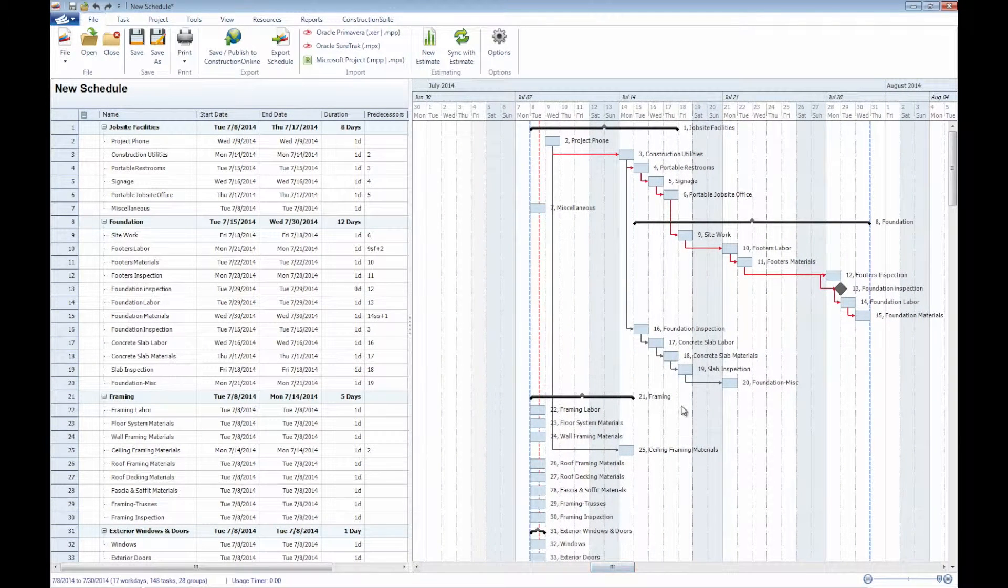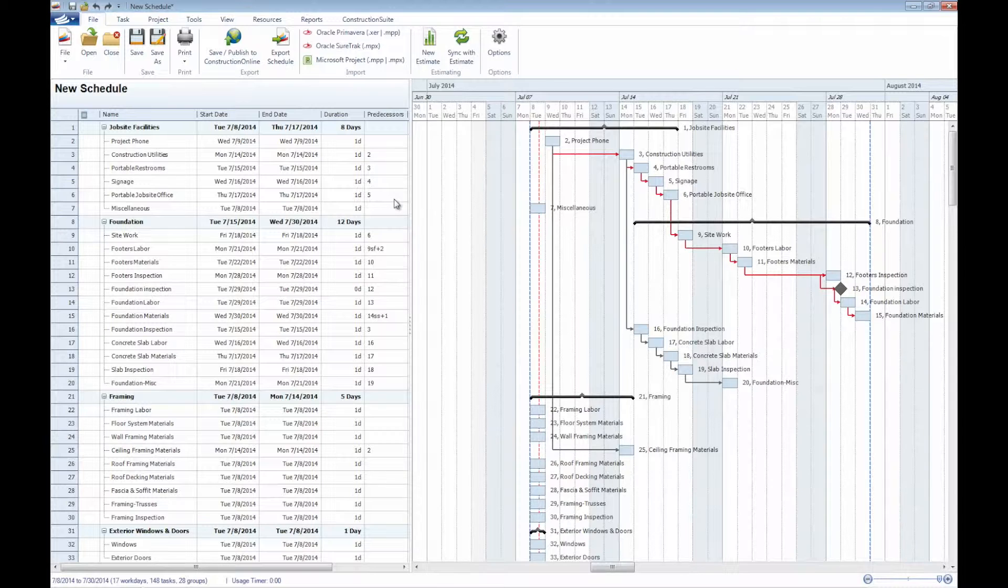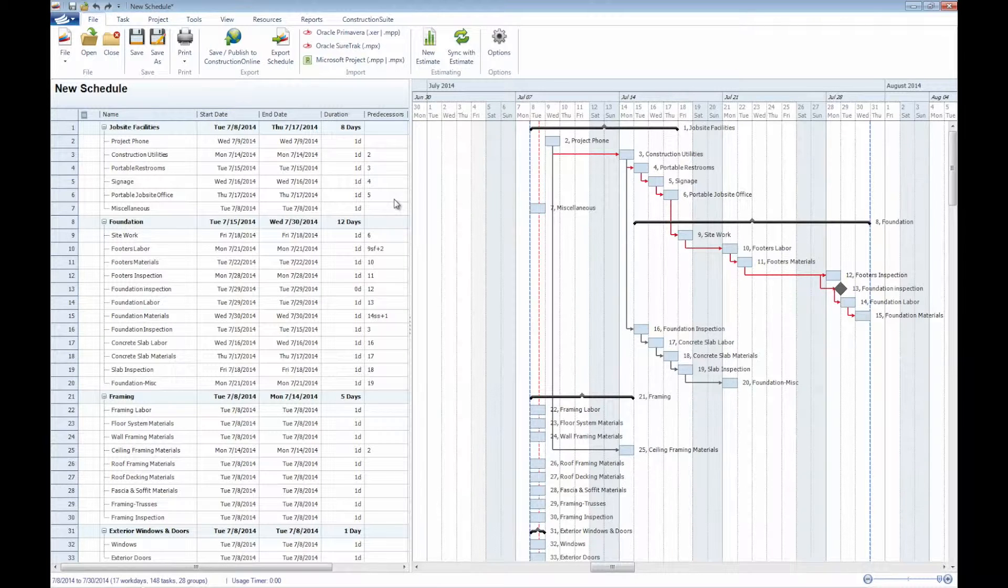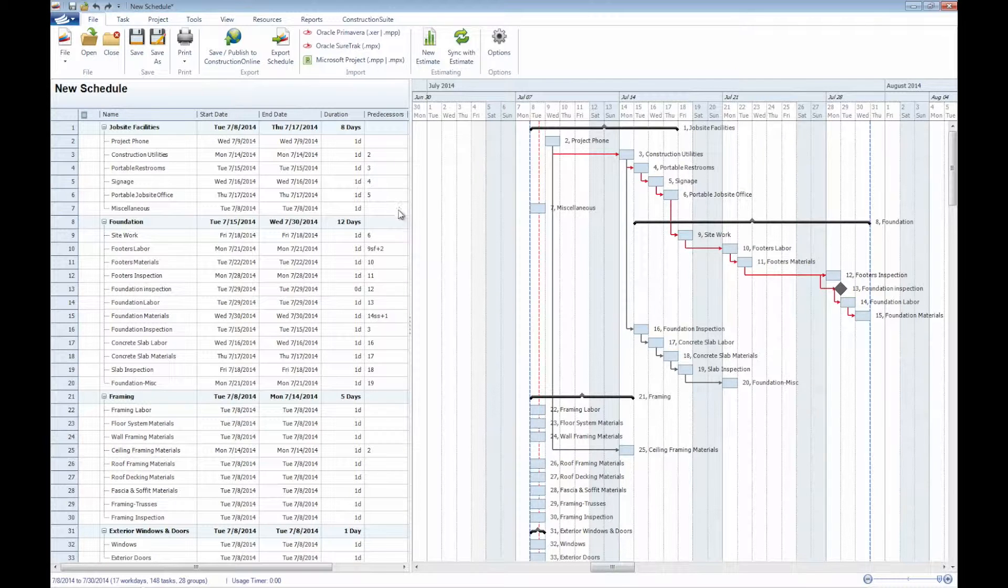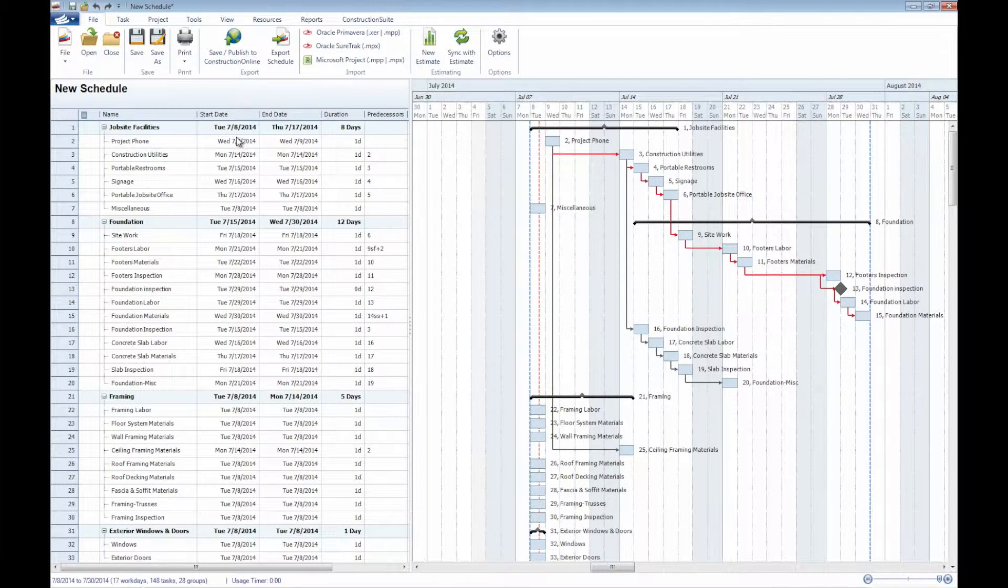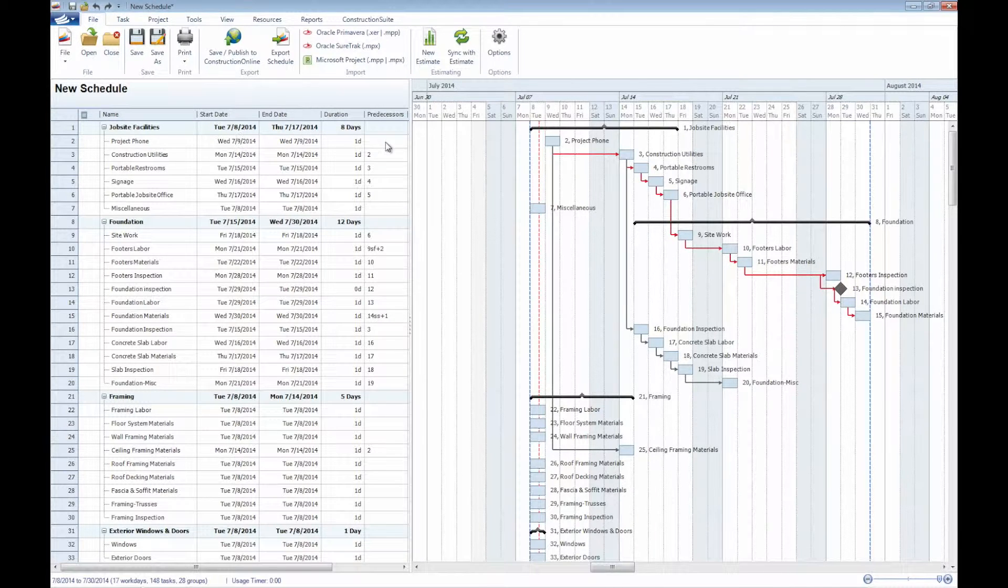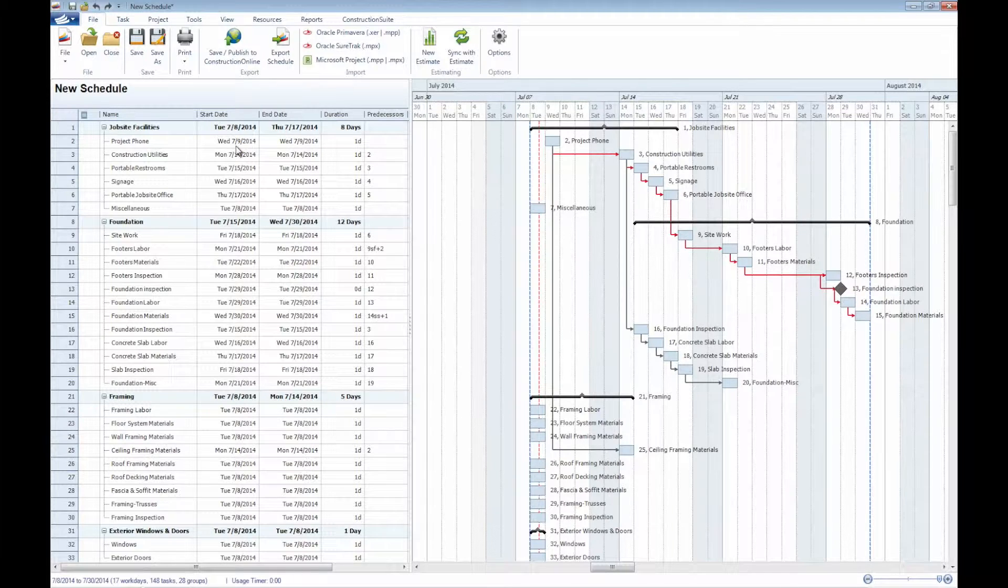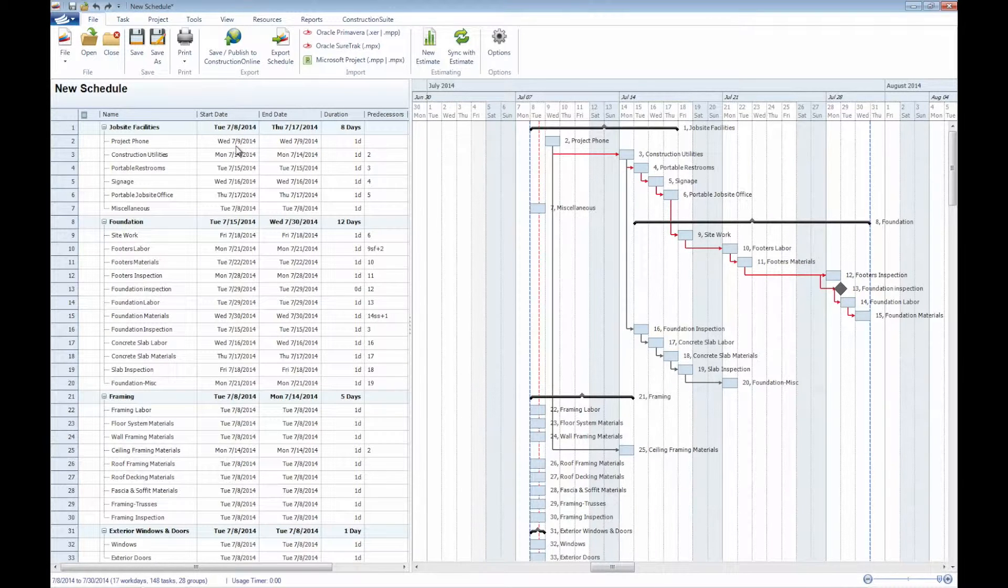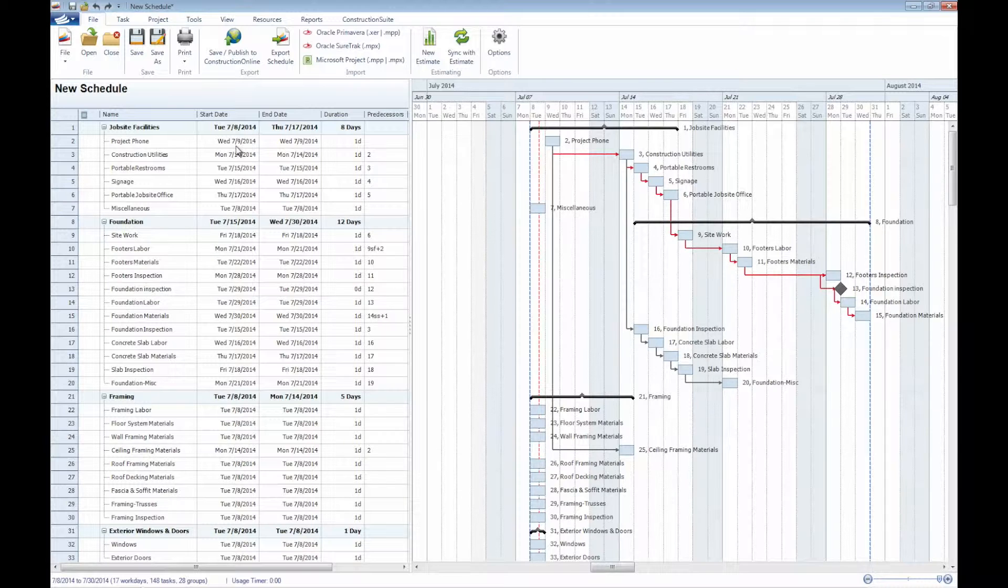Now this framework that we already had in place is going to already include some of the predecessor relationships and durations that we had already included from the original schedule, the one that we had already based this template off of, and we'll notice, though, that it still begins on today's date. So from the day that you first created this schedule, in which case it is July 8th, we'll see that from here on out, any sort of modification is going to start from this actual beginning date, the date that we created the schedule.